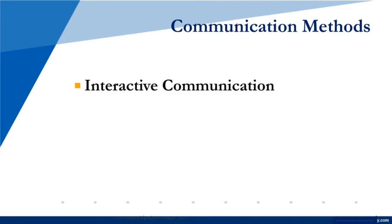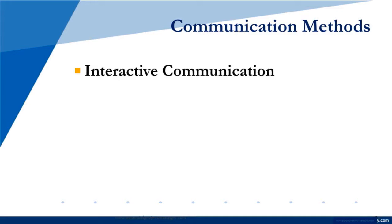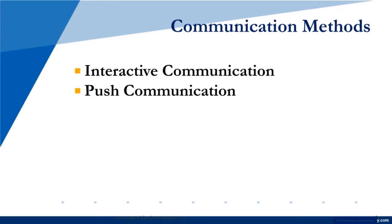Communication methods. We have interactive communication — that's when I can talk to you, you can talk to me, write to each other, text — it's interactive. We have push communication: things we simply push out. I may send you an email or a report — that's pushing it out. Electronic systems may generate a report and push out a communication not expecting any response. When I send out meeting minutes, that's generally a type of push communication — no response necessary.